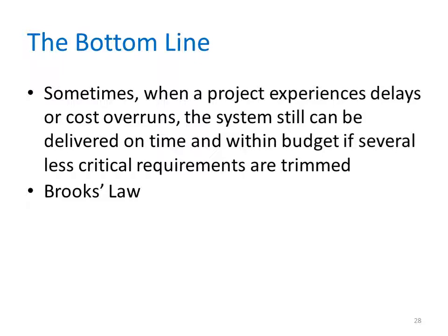Adding staff can also mean training and orienting new people, and in this case, that takes time away from the primary goal and can also actually delay the project. In some situations, adding more people to a project will actually increase the time necessary to complete the project. And there's a principle called Brooks' Law that identifies this. It was developed by Frederick Brooks, Jr., an IBM engineer, who observed that by adding manpower to a late software project, it only makes it later. He came to this conclusion when he saw that new workers on a project first had to be educated and instructed by the existing employees, whose own productivity then was decreased.